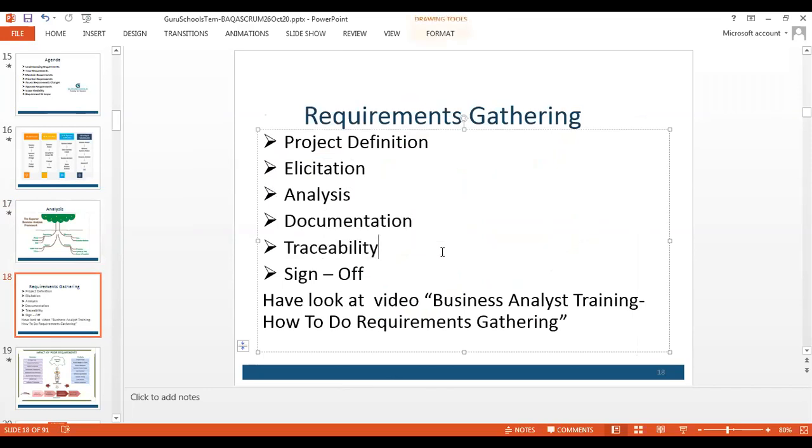Traceability is tracking the wish list of a stakeholder to a functionality which is embedded in the product. So when I say an iris scanner is to be included at a client place, I need to build the traceability. Who said it, when they said it, at what point it was a really critical requirement with top priority, and how I evolved it to a level where I can implement an iris scanner at a client location. That's the overall traceability of it. We'll try to learn the tools available, and even how to trace it in a typical Excel sheet. So we'll learn those things.